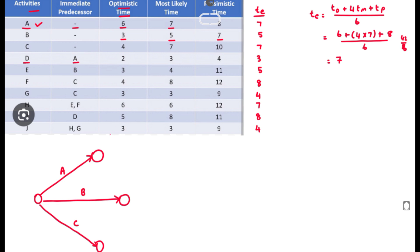For activity D, A is the predecessor activity, so we draw D coming from A. For activity E, B is the predecessor activity, so we draw E activity coming from B.